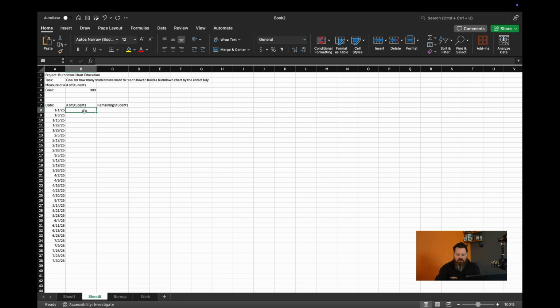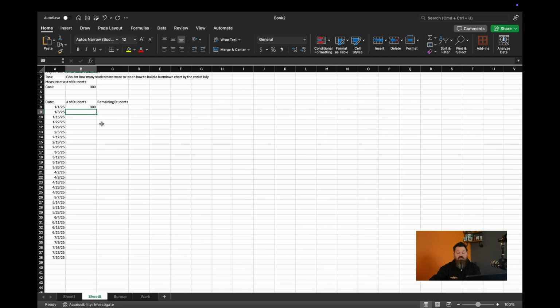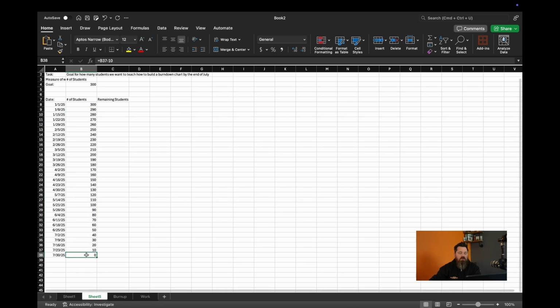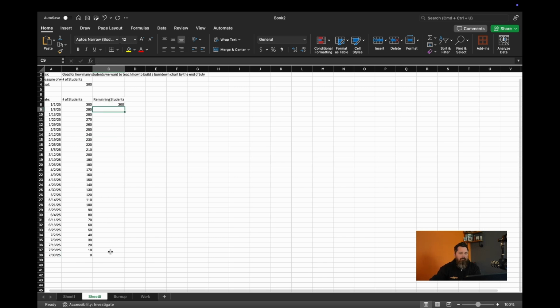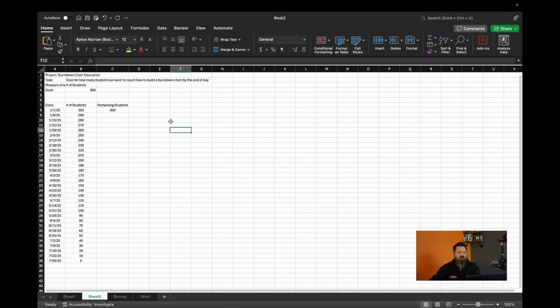Now, if we do the math, we have 300 students. Those 300 students, we need to get to 0 by the end of July, which, if we do the math, is about 10 a week. So we'll go here and just put 300 minus 10, and we'll drag it down to our last date, July 1st, or end of July, and we have 0. Remaining students, 300, because we haven't gone anywhere yet. And just do some cleanup here, center that, awesome. All right, so now we've got the basis of what our burndown chart is going to look like.